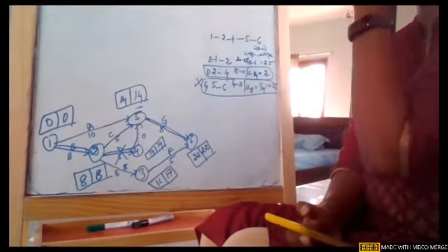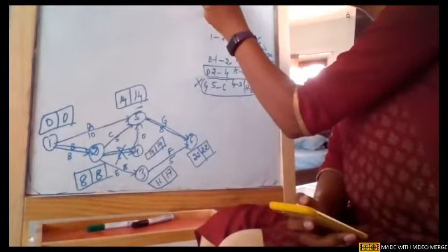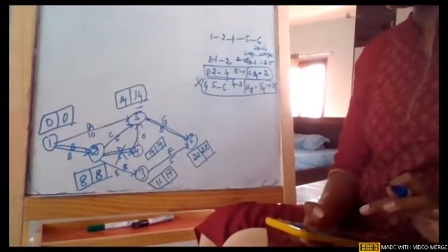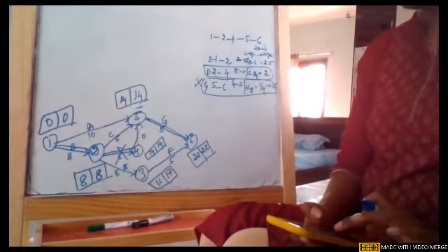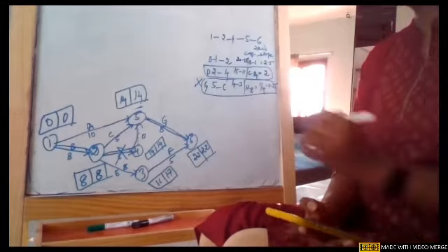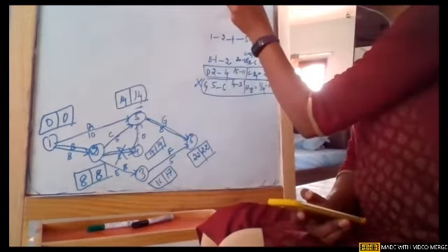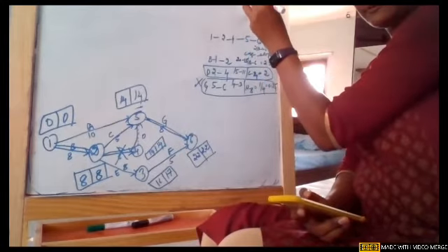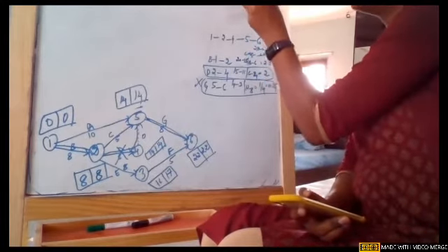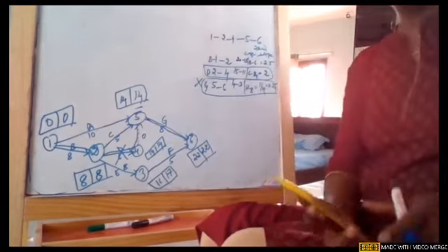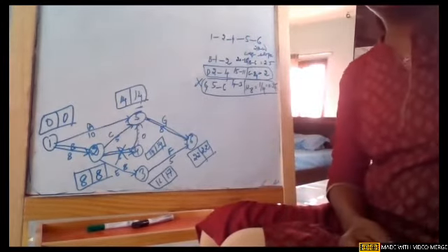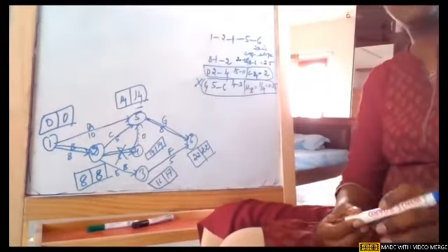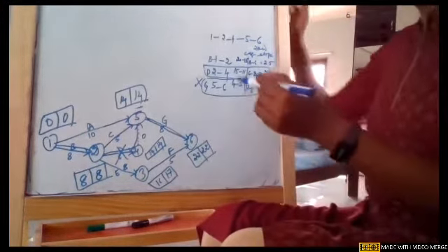So it is 1000. So I'm just adding the cost, 61,600 plus 73,000. The cost has been reduced to, earlier it was 145 thousand, now it is 1,35,600. So this is the new cost. After crashing, we are able to reduce the duration, the cost as well. Not just the duration by 4 weeks, we are also able to reduce the cost.